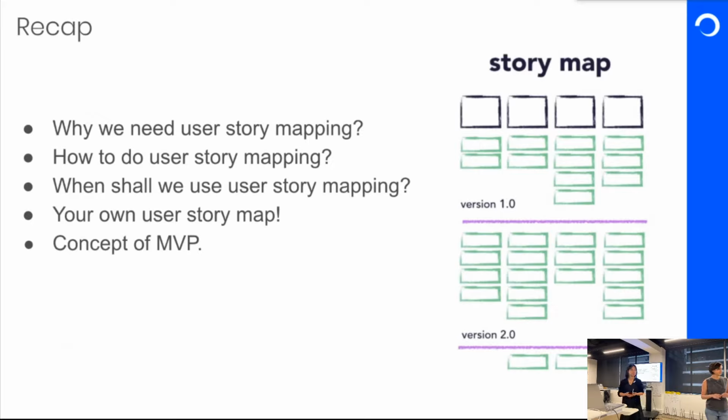Yeah. Okay, who can remember how to make a user story map step by step? First one. Write down your product map. Persona. Yeah. Then user goals. User journey. Yeah. Goals. Yeah. Then user journeys. The backbones. And then break into specific tasks. Yes, specific tasks, and then prioritization.